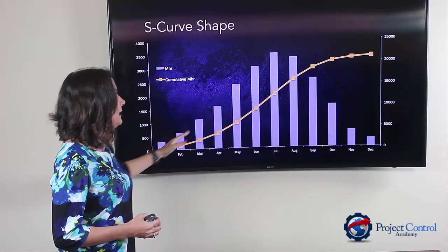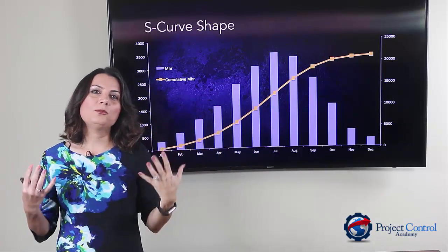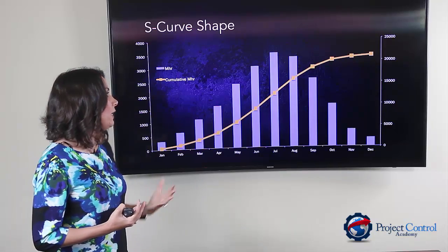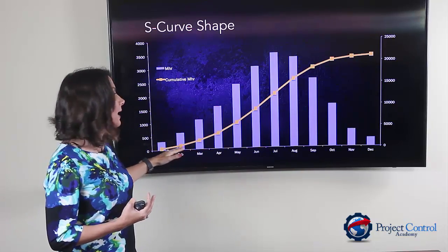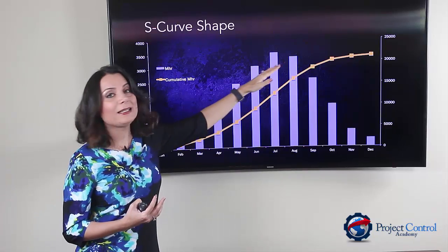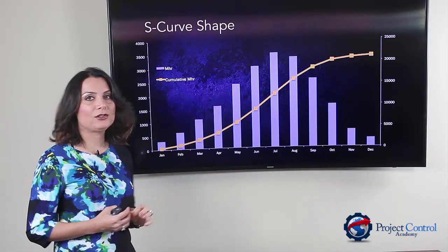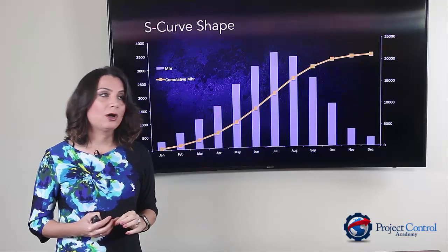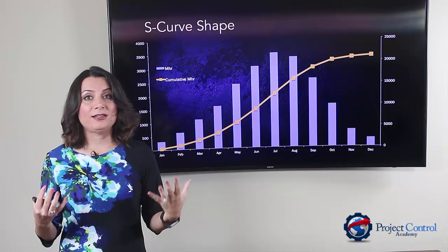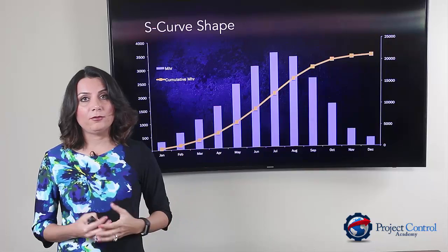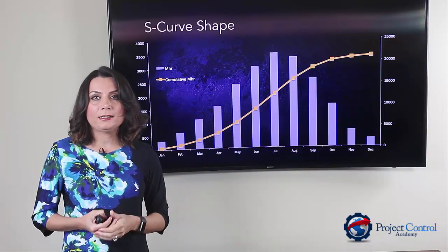So you will see that as a typical shape in most projects. If I convert this to a cumulative curve, that would be something like the S-curve you see here on the orange bar. That's why it creates an S-shape based on the essence of projects.